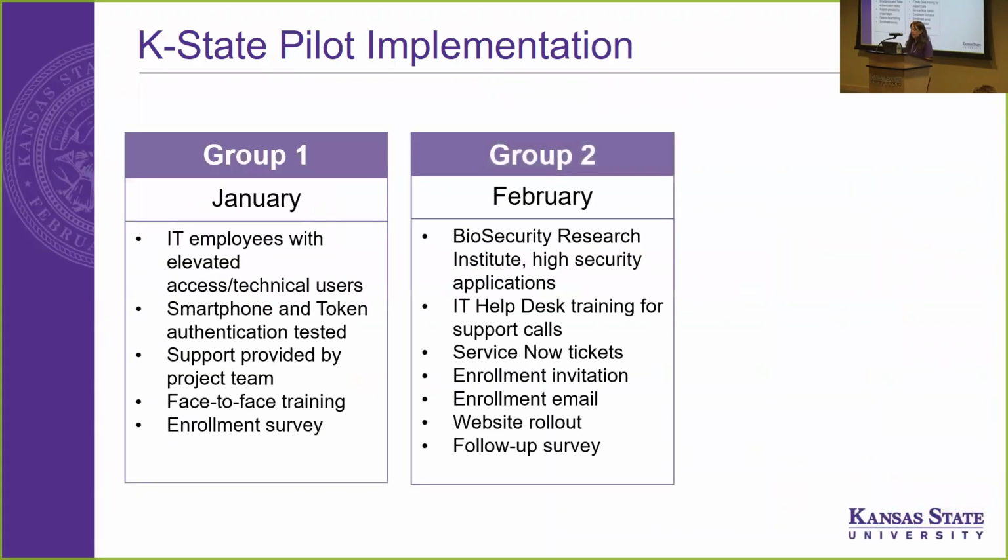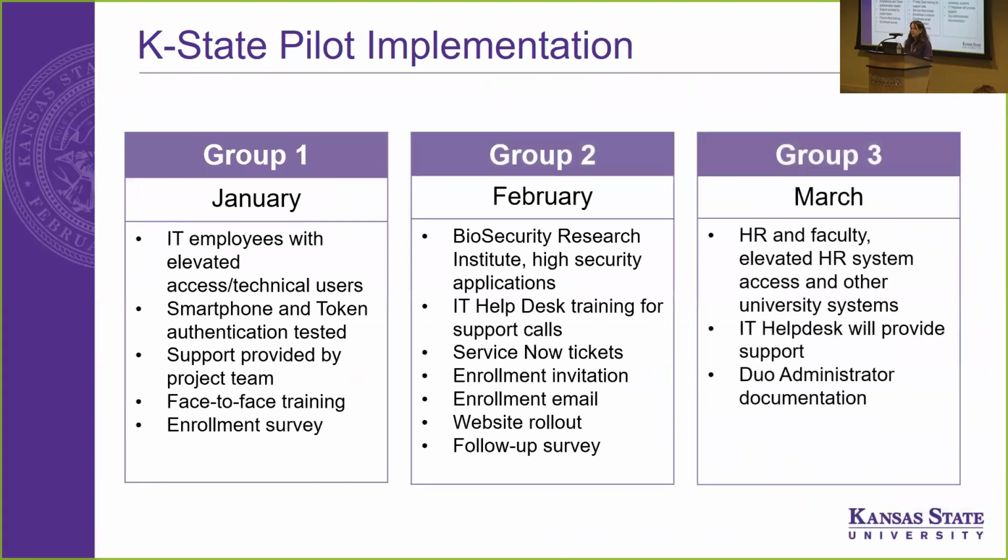We implemented three groups in our pilot and used about 300 licenses. So our first group was IT employees with elevated access. And we did that training face-to-face. So that's how we started the first group.